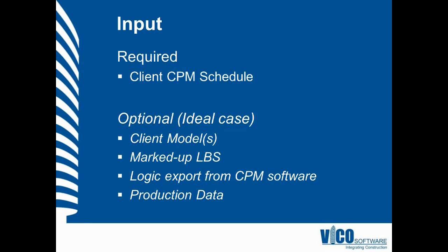However, there's much more value to be had if you can utilize any existing models that you may have for the job. Of course, we can use the 3D models for visualizing the work and also planning the locations so that we have a quantity-wise balance and geometry in the workflow in the schedule. It's very helpful, but not necessary, to get a logic export from whatever CPM software you're using. I usually ask for this one first. It helps to expedite the process.